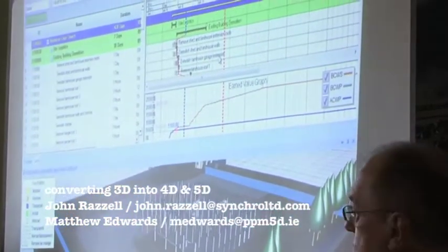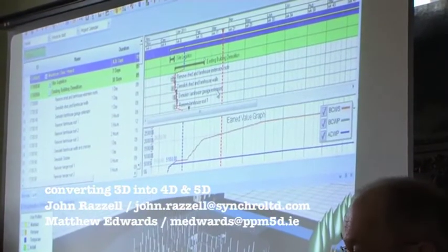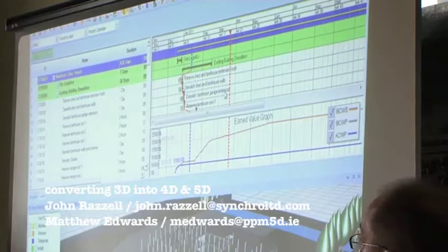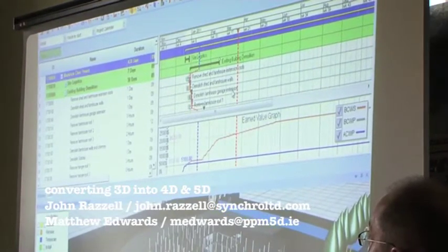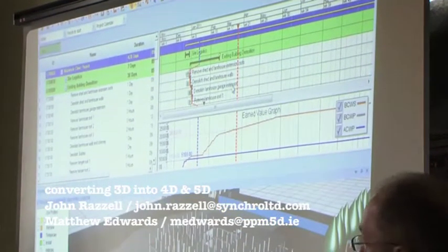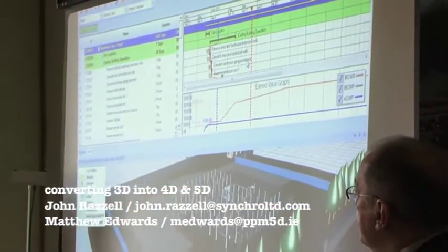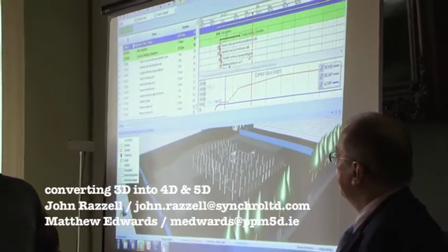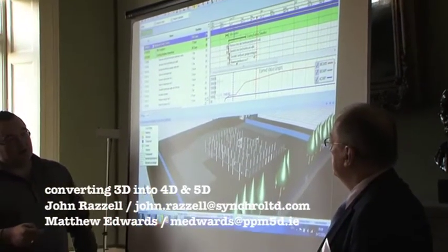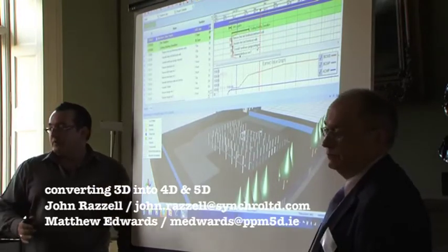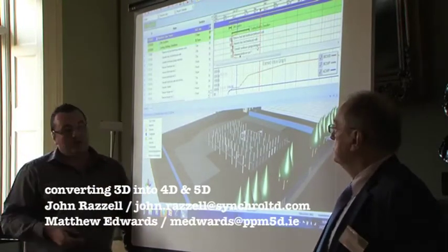So when we start progressing the job on site, we can actually look at the BIM cash flow, for example, for the project as well. So this is what we plan to do, and this is our actual status to date. You can see that the actual is on par there, so that's fine. But obviously that will start to dip down a bit on the cash flow, and that's where 5D is fundamentally important in BIM for contractors.